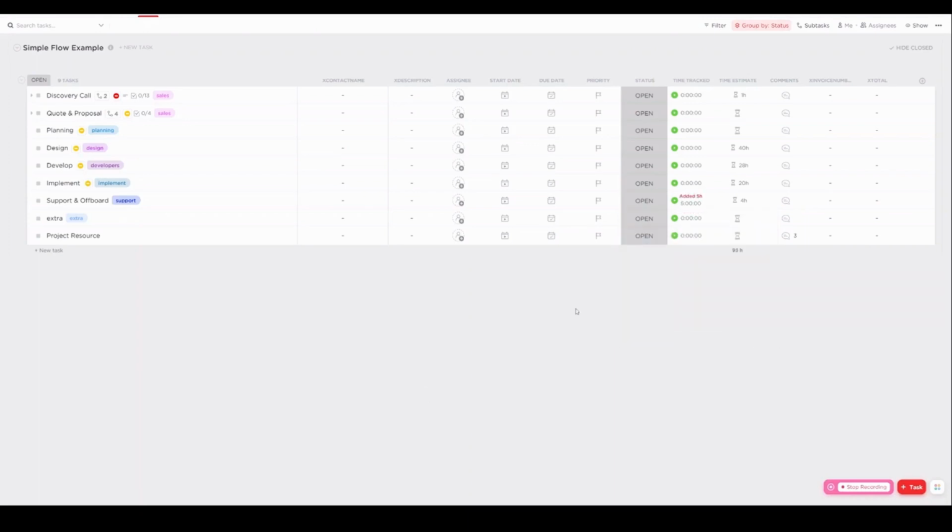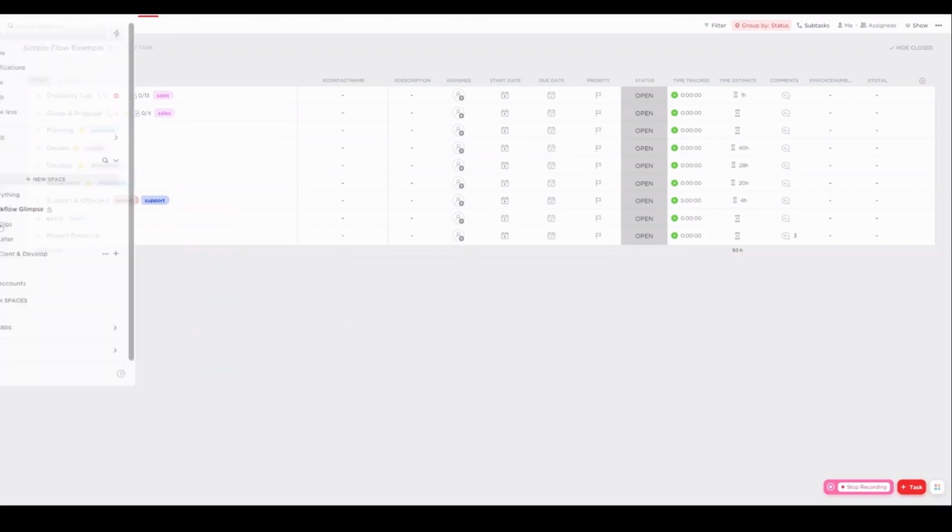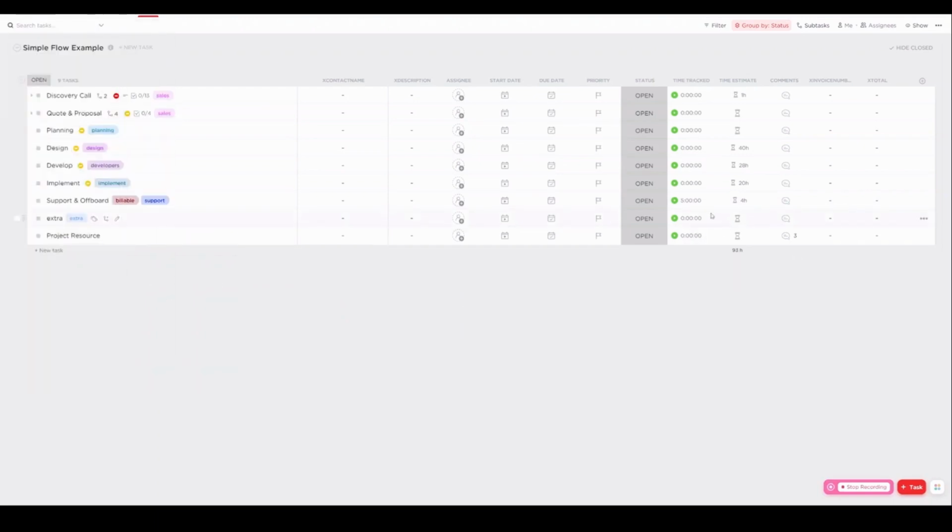That way the project manager will know that it was estimated for 4 hours, but we did an actual 5 hours, and then the project manager can decide whether 1 extra hour has to be billed or not. And if it has to be billed, the project manager will go in and add billable, so that we know as a team that there was an extra 1 hour which has to be billed separately.